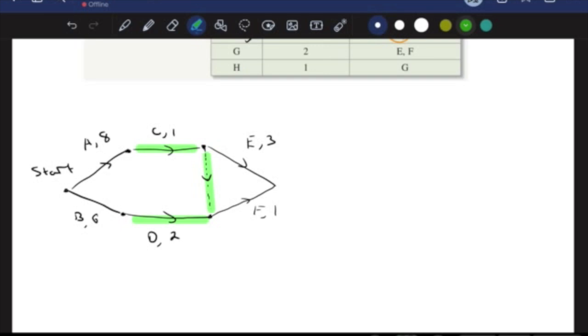Because my activity F comes out of this vertex, I have to write in the dummy activity basically at this particular point. So that this shows that I've done C and I've done D at this point before I'm ready to go and do F. So since this is a dummy activity, when we write a weight, I don't have to label this activity, but I have to write that the weight is 0. Because remember, this is an imaginary task. So I'm going to write it like this.